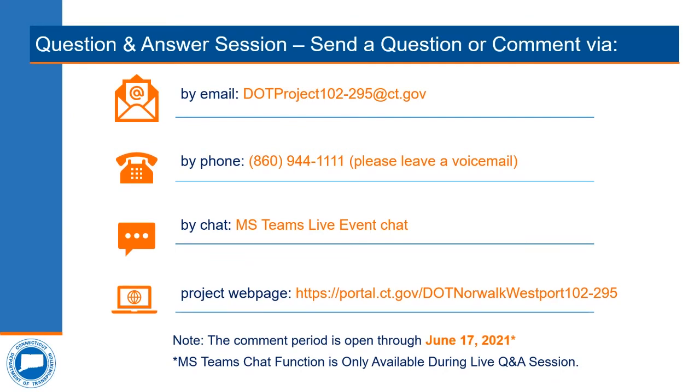Thanks, Dom. Again, appreciate it. Bob Nowak, Construction Project Manager. Typically in the winter for construction, the project does have a winter shutdown period, so there's no major anticipated construction activity through the winter, which is December 1st through March 31st. Now again, late fall, early spring, there's no foliage, and we understand that.